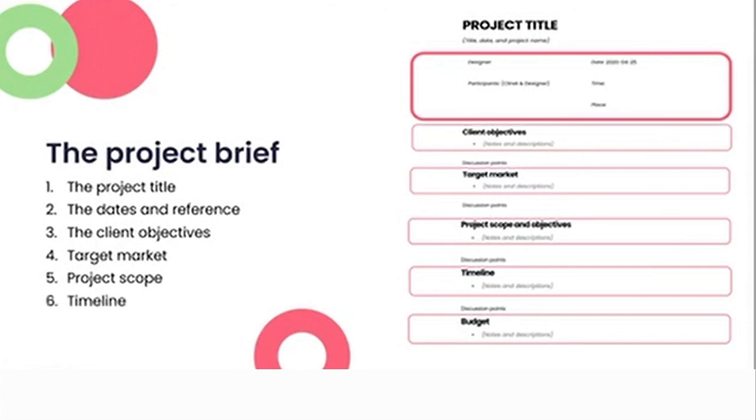The next point on our project brief is our timeline. So if we are using our example to create our timeline, in Sophia's instance, she needs us to complete this project in a month. I know that drawings will take approximately 2 weeks and the installation of the project approximately 3 weeks. So obviously this is going to take 5 weeks, which is a little bit above her expectation. We need to ensure that this is documented and have the client sign this off.